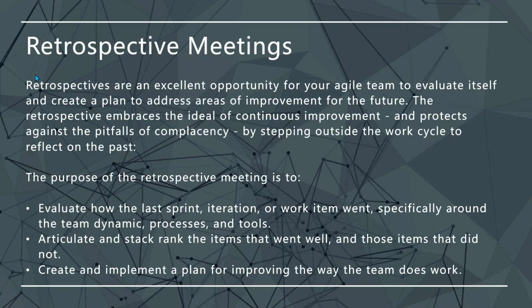These retrospective meetings generally happen at the end of the sprint. Say you are working on a 2 week sprint project; usually the retrospective happens on the last day of the sprint. Sometimes it might happen one day before the last day. During that time you will sit with the team and try to understand what went well and what did not go well.